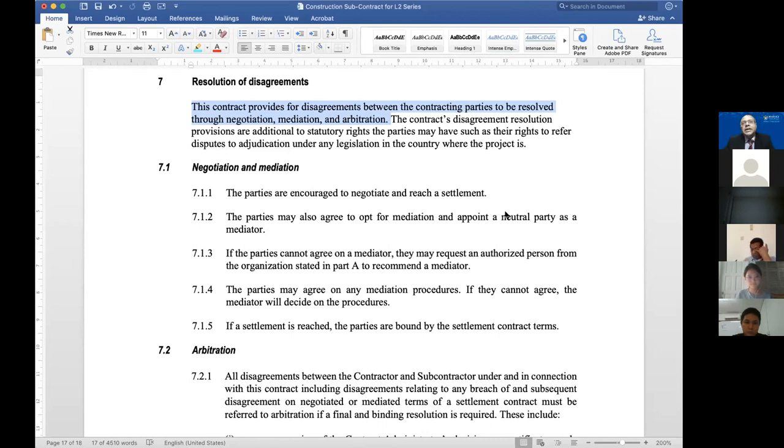The differences in termination are terminating the contract itself, which means see you in court, I'm not going to comply with any instructions given by anybody, or terminating the employment of the contractor, or in this case, subcontractor. That means, okay, stop work. You don't have to do anymore. I'm going to end the contract, but you still have to follow the process because we've still got a binding contract. So in other words, what has been terminated is the employment, not necessarily the contract.